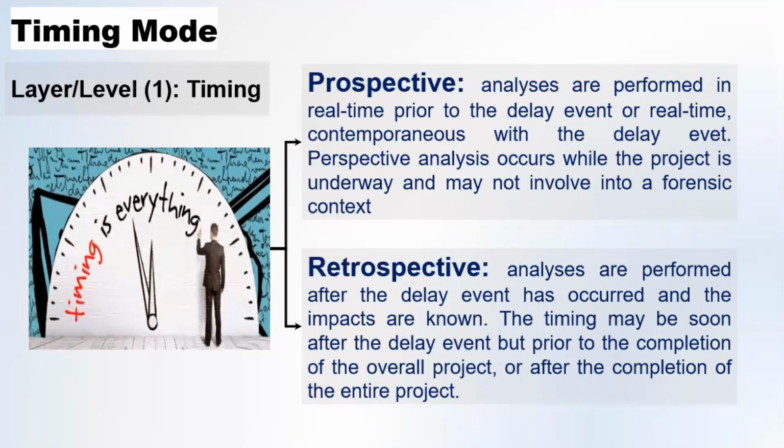If the event is in the future, so if an owner or employer comes to the contractor and asks him to do a certain variation order or additional scope that will take place according to the schedule later on, not now. For example, if I tell you I need another connection point to the tie-in point for the building, or I'm going to revise the mountable partitions to demountable partitions, and I'm at the stage of excavation, this variation is going to come later on. So the event is prospective, which comes in the future.